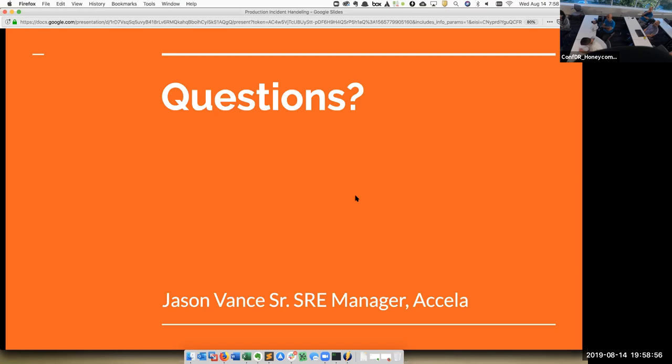Jason, do you have any of your SREs sit on any of the dev scrum teams? We do. We have an SRE embedded in every single one of the teams. We have them in for two things. It's, again, communication. They're not part of the team, so the scrum teams can't assign them anything. But when they're having meetings, I require them to be at least in the sprint review and the sprint planning meeting with them.